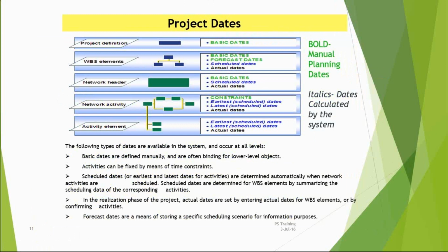In this way, I'm going to calculate my critical path. Critical path is where the float is 0. I mean, this activity should start on this date. There is a 0% delay. And it should get finished on this date. Got it.